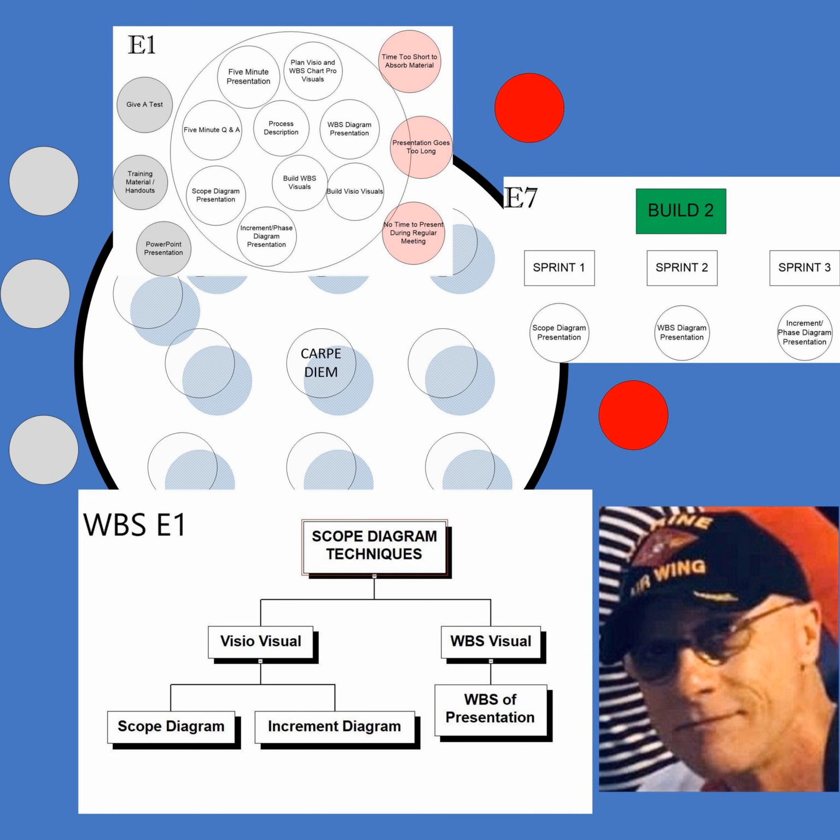Every week for 6 months, all the stakeholders were on the meeting, and you reviewed this. And believe it or not, within 2 or 3 months, some of this changed. No, we can't move before this moves. We can't do this. They didn't figure it out right away. But after seeing this every week, they figured out, oh wow, we can't move until this system's in place. And we changed it around. By the time the move started, all this was set in concrete. Look at move 9. It's going to X, and the ones that were going to Z were labeled like that. 418, 9 racks, these are the 2 systems. And this was in front of them every single week.